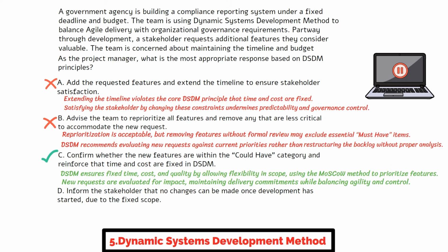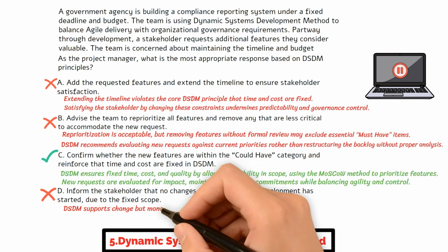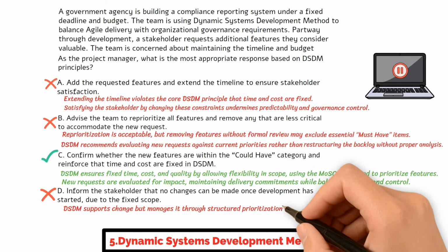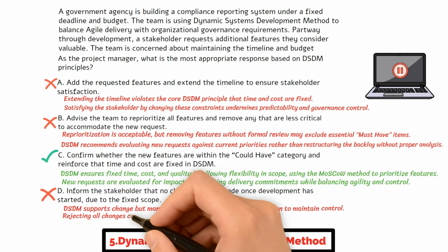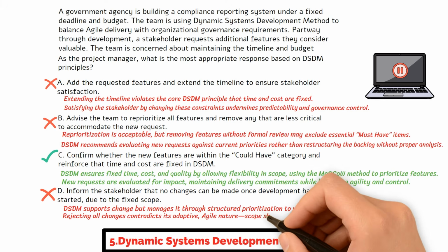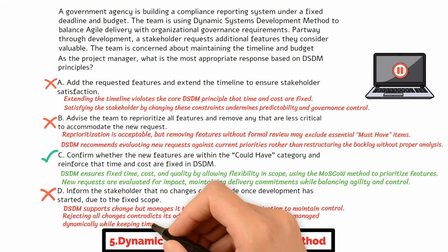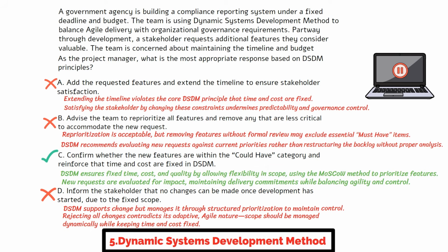without structured analysis. Choice D is incorrect. DSDM does allow change, but manages it through structured prioritization. Saying no to all changes contradicts DSDM's agile and adaptive nature. The key is to manage scope dynamically while keeping time and cost fixed. Okay, let's move on if you are ready.